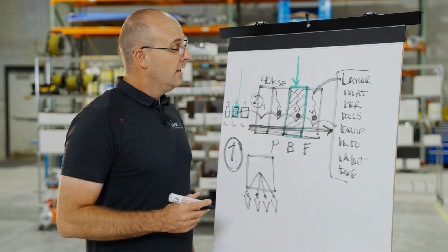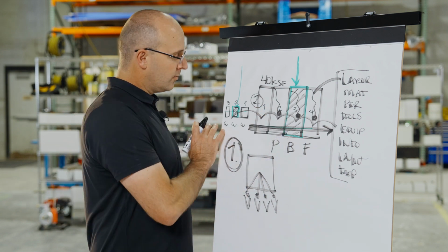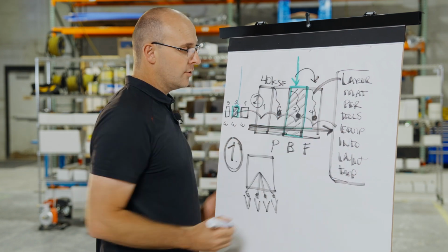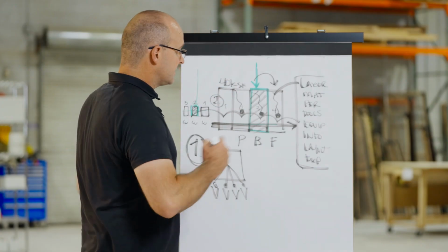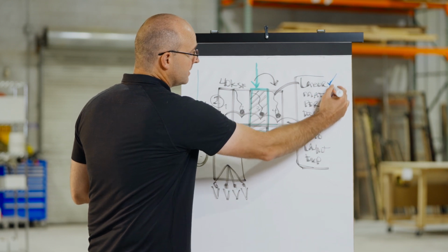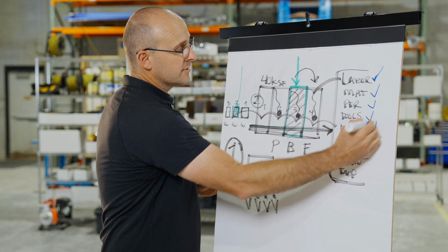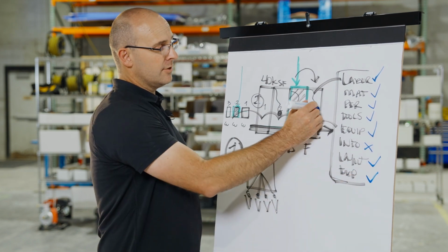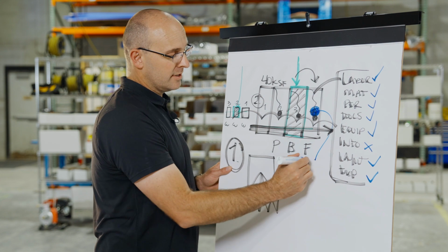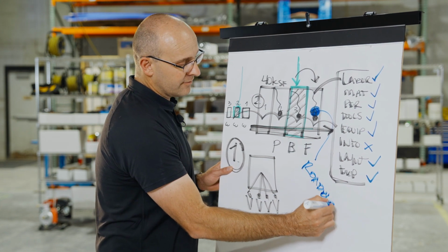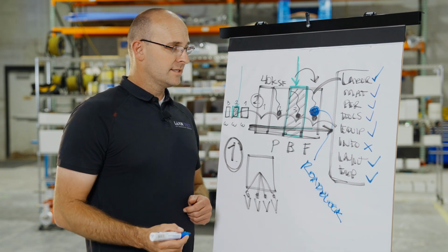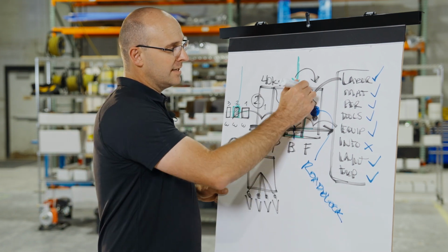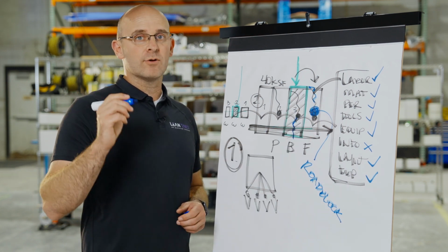You as a crew leader or a foreman are not just paying attention to the moment. You're always looking at these flow principles, and you're always looking at, do we have everything we need for the next zone in one process flow? And if you don't, it's key to say, hey, got enough labor, materials are good, permissions are good, tools are good, equipment's good, right? Oh, I don't have that RFI response for this one key room. Layout's good, expectations are good. Now that you know there's a problem right here, guess what? That becomes a roadblock. That now should get fanatically tracked in your systems, on your checklist, or on your visual maps, and fanatically be attended to and removed before your crew gets done and hits that spot so that you don't have to slow down or stop and then restart.